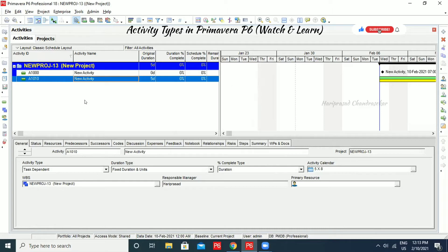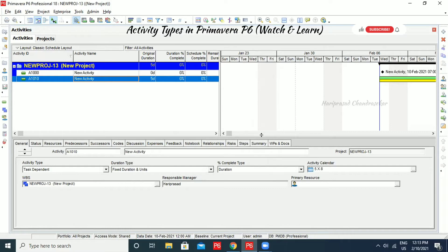The activities and resources are scheduled to work according to the activity calendar, not the resource calendar. Duration is determined by the assigned calendar work week. So if you have any other work week, the duration will depend on that.